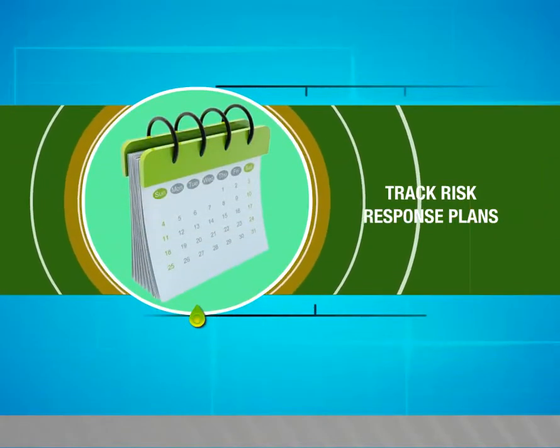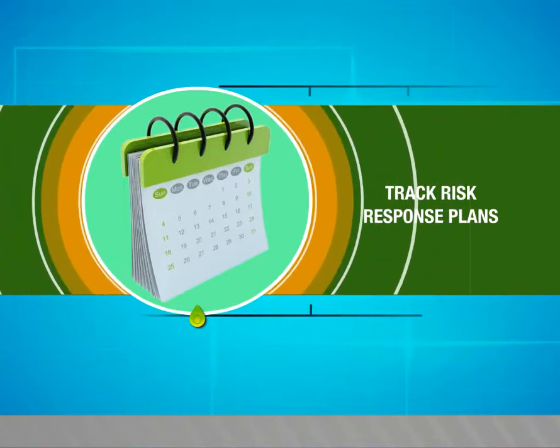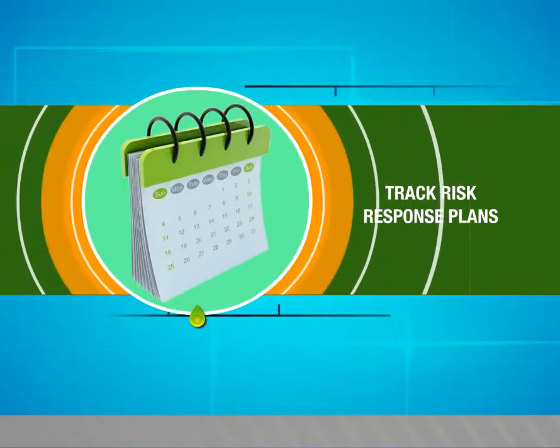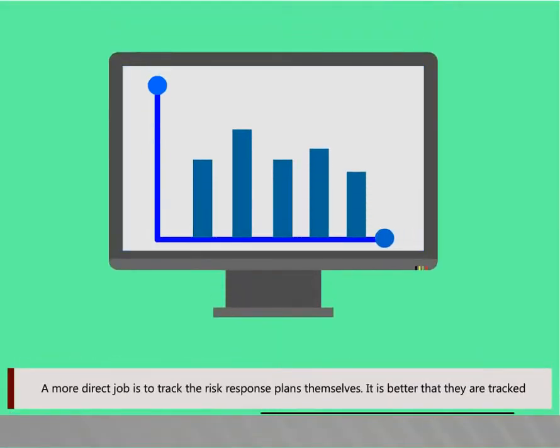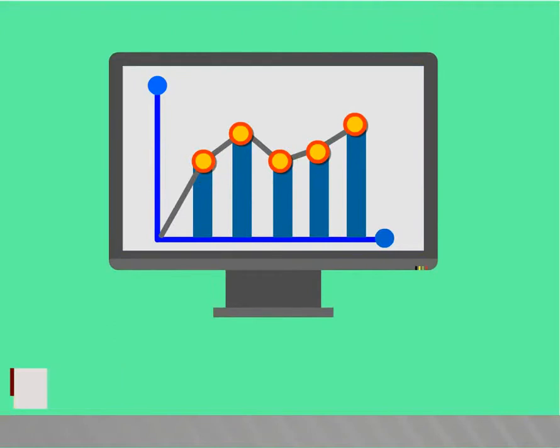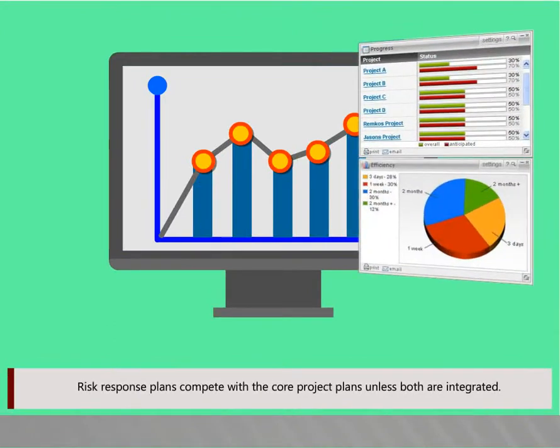Track risk response plans. In this video, we are going to see about tracking risk response plans. A more direct job is to track the risk response plans themselves. It is better that they are tracked. Risk response plans compete with the core project plans unless both are integrated.